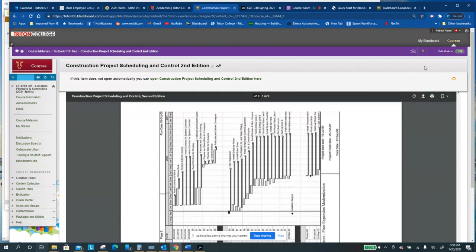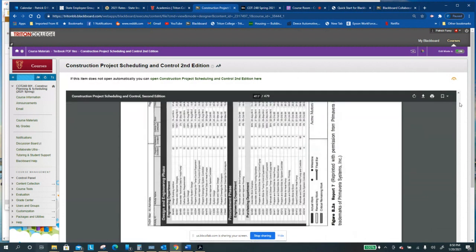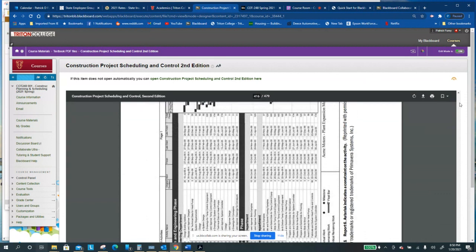This schedule is usually a living document. It's something that you're updating, ideally. If you're using it as a control, you're updating it daily or weekly, some point to track. It's one thing to plan a job. It's another thing to track it. Did it take us longer than we thought? If I'm a business owner, if I'm a contractor, that's something I want to know. If I thought it was going to take us 4 weeks and it took us 6, I sure as heck want to know, because that, again, is money.